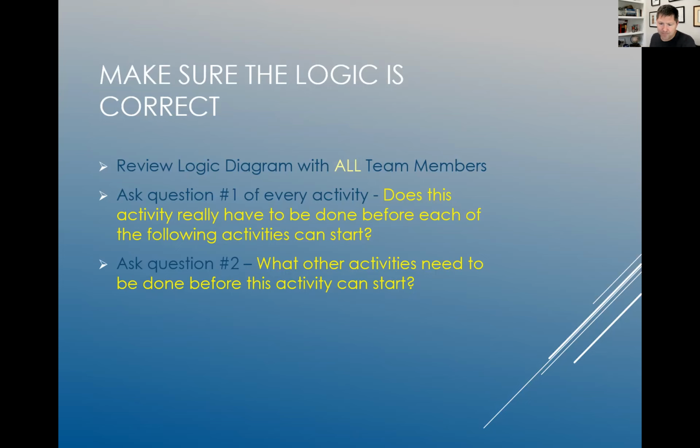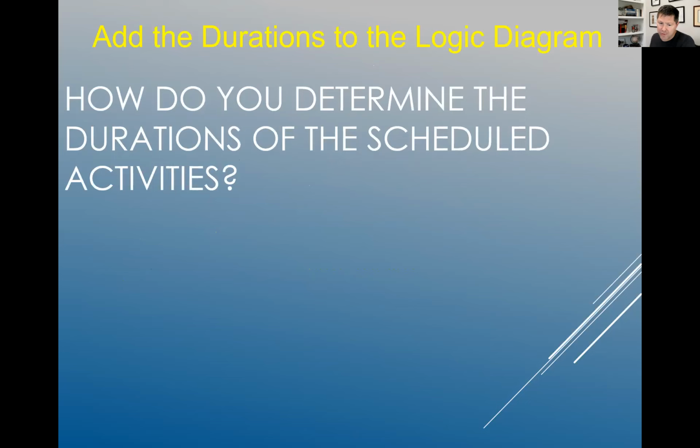All right, add the durations to the logic diagram. How do you determine the durations of scheduled activities? This is very important. You ask your subcontractors.